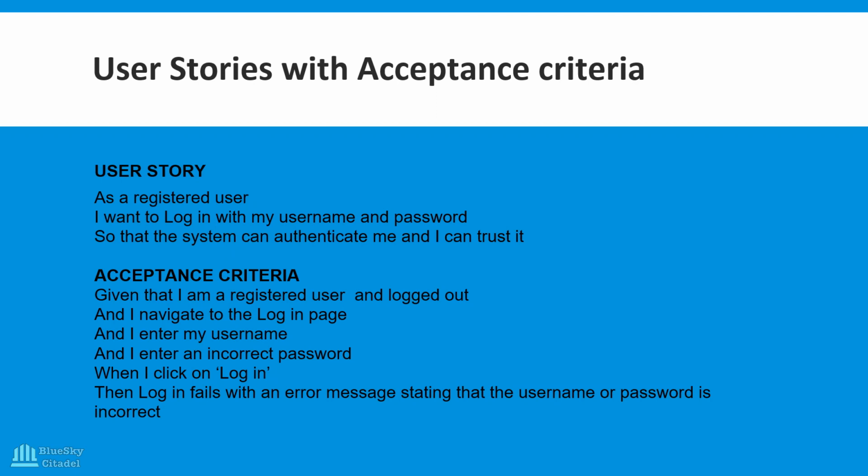So if I enter a correct password, what should happen? I should be able to log in. What if I enter an incorrect password? Should I be able to log in? The answer is no, so we're going to test it, right? This is what informs your acceptance criteria and forms the basis for testing.